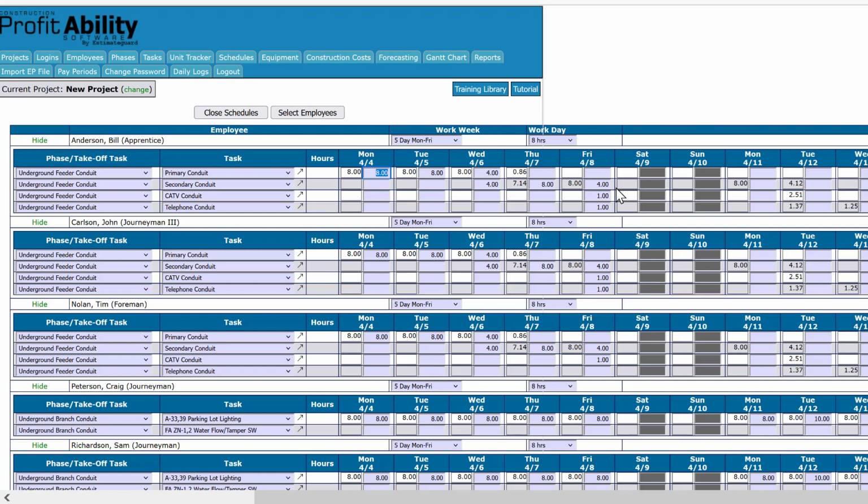And normally what I find is if someone's not completing their work on time, there's 1 of 2 problems. One, they encountered something on site that wasn't predictable that they had to maneuver around, or that slowed them down. Could even be another trade in the way, right? The second thing is that they need training. Okay, so if you have a worker that's working for you that needs training on a certain task or series of tasks, that's going to become real obvious. You're going to know who needs training and who doesn't, okay?